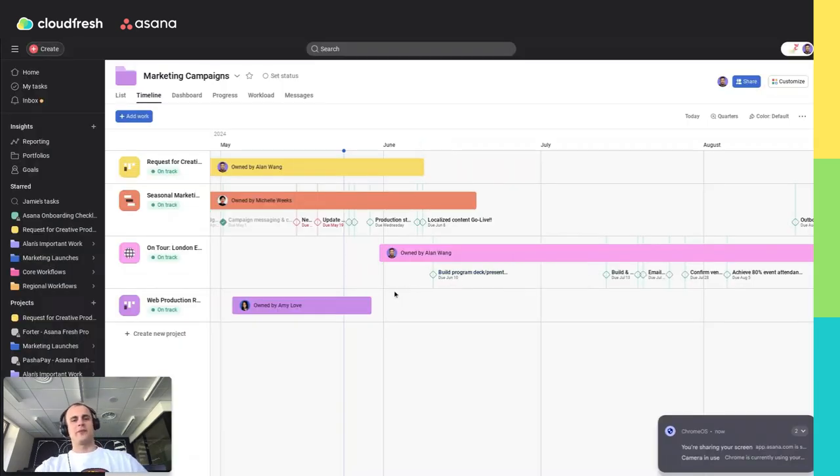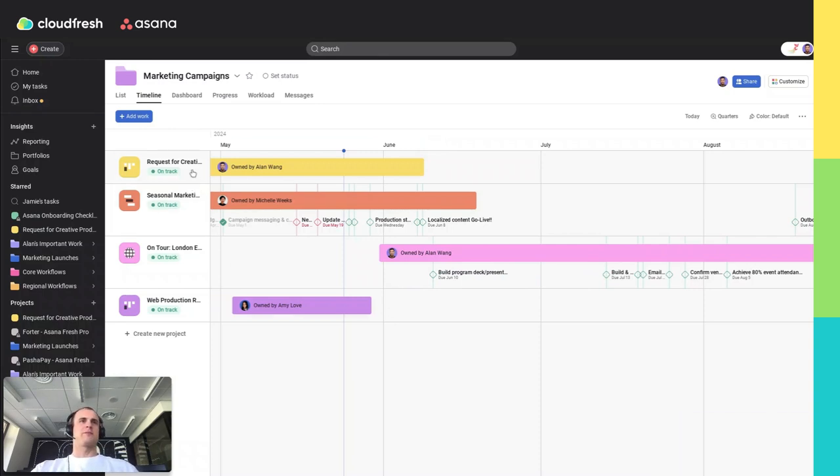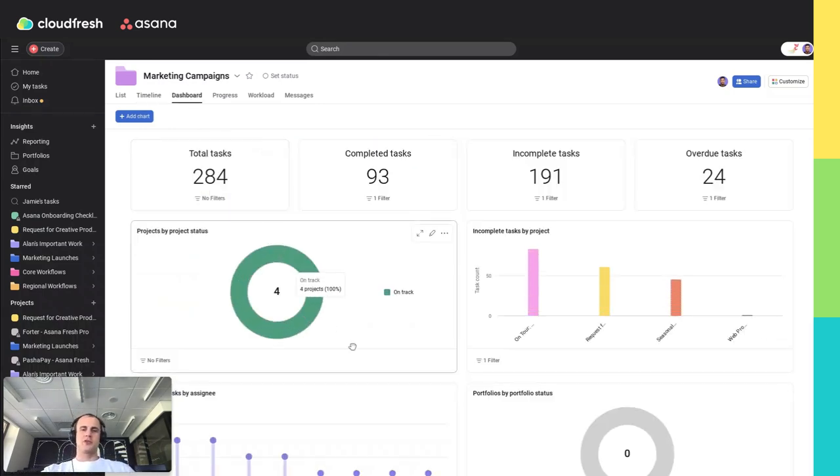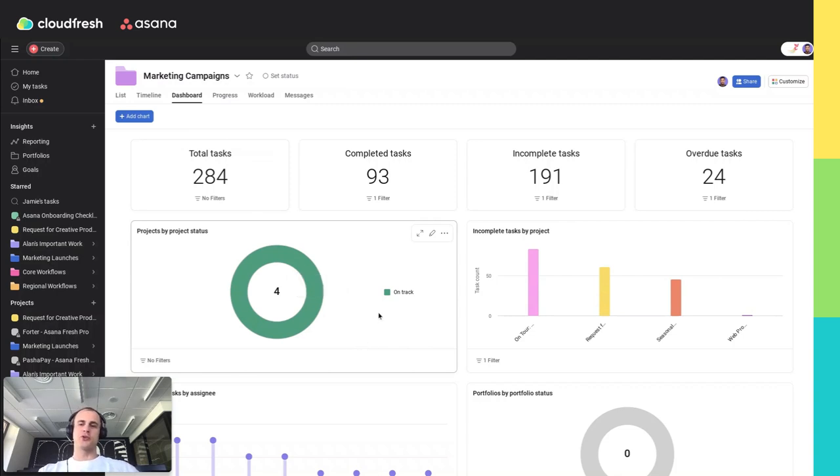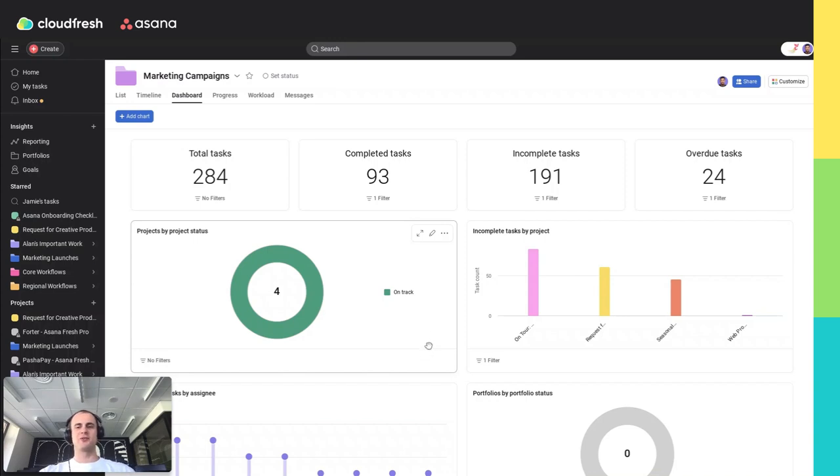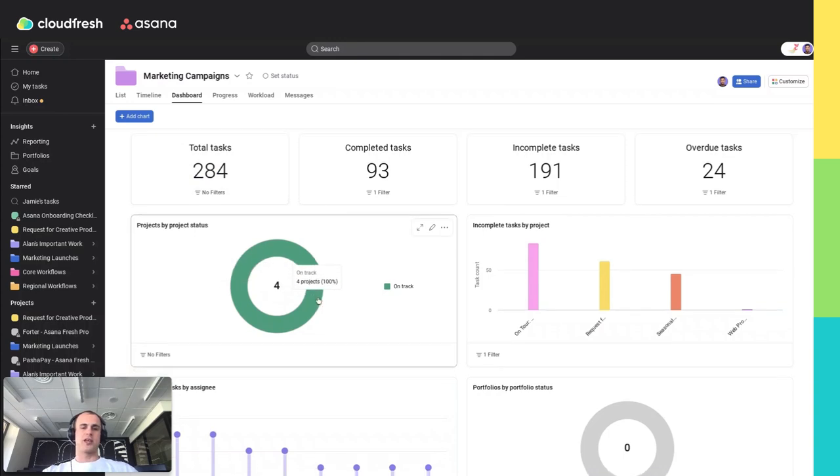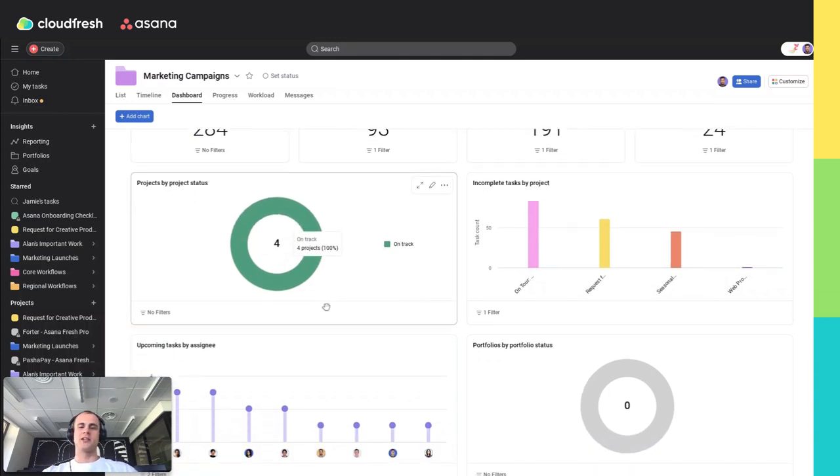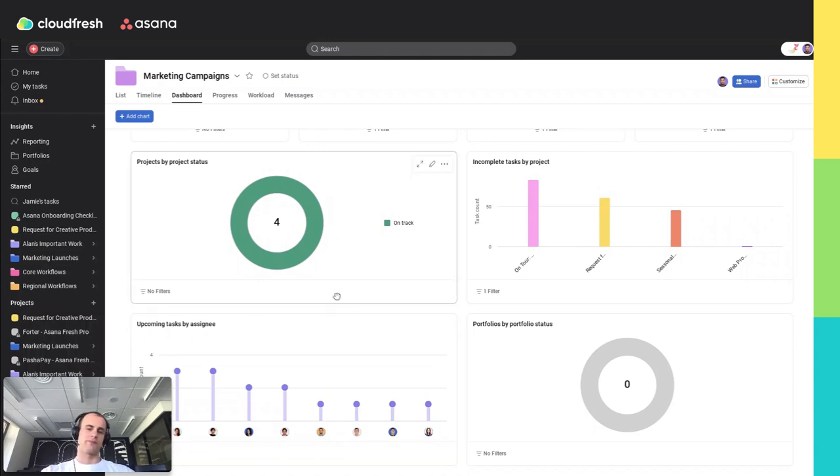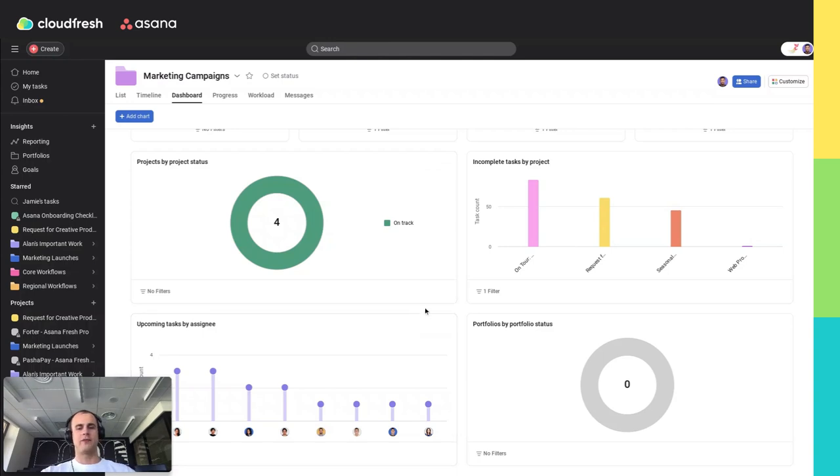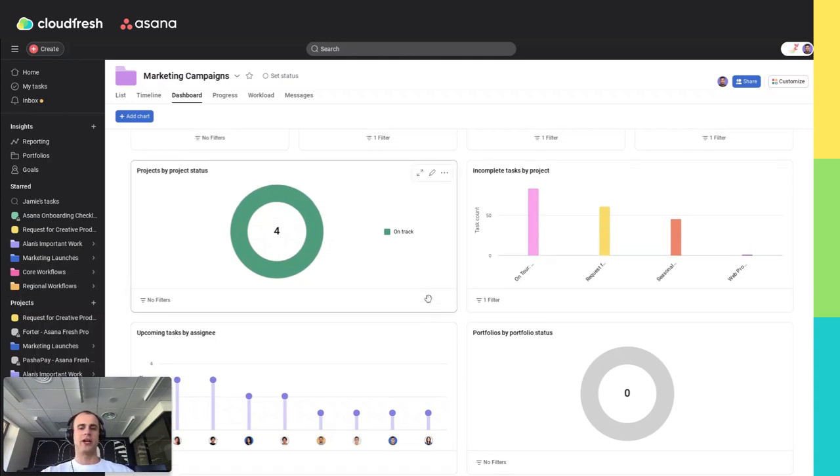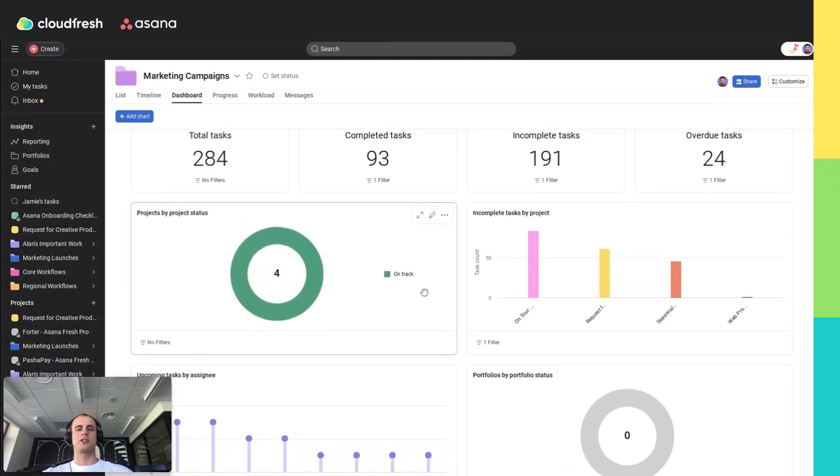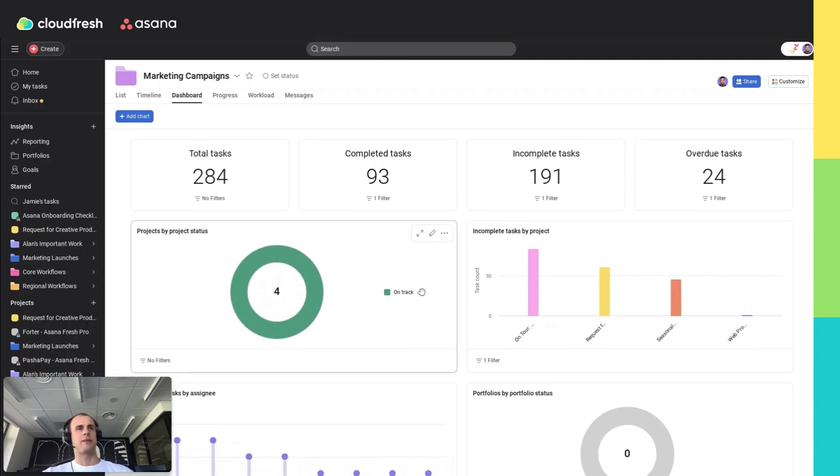Step 5: Tracking progress with dashboards. Dashboards in Asana portfolios provide powerful visualization tools to monitor the health and status of your projects. To access the dashboard, navigate to the dashboard tab within your portfolio. Here you can create custom charts to track key metrics like budget, time spent, and project progress. These charts can help you identify trends and strengths, monitor your project statuses, and report to senior leadership efficiently. Dashboards bring data to life, offering real-time clarity and actionable insights directly within the portfolios tab.